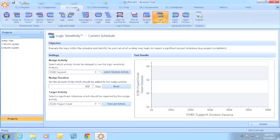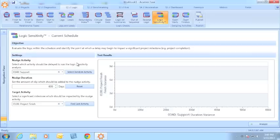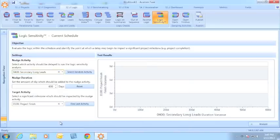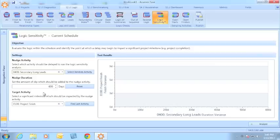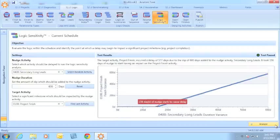We've also added the ability to evaluate logic sensitivity on your project. This means I can evaluate how sensitive my schedule is to a delay. I can select any activity, such as secondary long leads, define the amount of delay or the amount of duration I would like added to that activity, and then see how that delay impacts a key milestone such as project finish. Let's run the analysis.